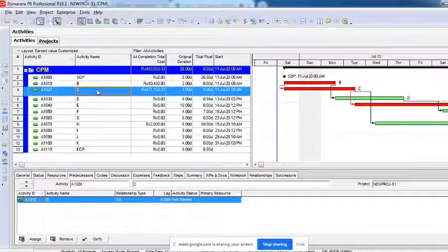That is what we call resource analysis. Very importantly, there are two things you will have to remember whenever we plan for these activities. Just to say that I want so many people, I need so many masons, so many carpenters, laborers, helpers, however much quantity of material, what you're asking is only a request. It does not mean that you have so much.